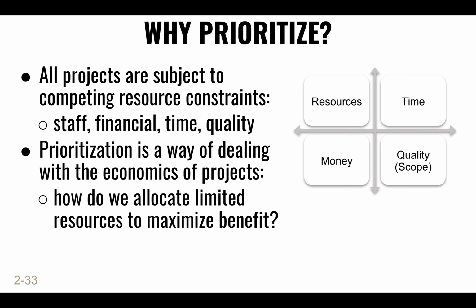Yes. Is it more likely for those critical things that you talked about for the business to place them on sprints in advance and then keep the low and medium stuff? Exactly, but to be able to decide what goes in at the beginning of the sprint, we need to be able to have relative priorities between the two, right? So be able to say, if you look at these 2, which one would you build first, right? At first you would say, well, they're all critical, but then one of the techniques is to say, okay, well, no, let's take 2 at a time, right?